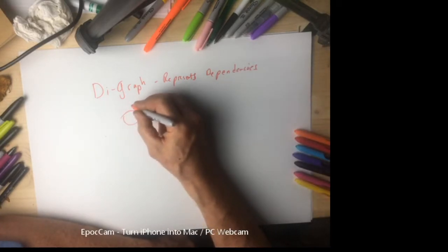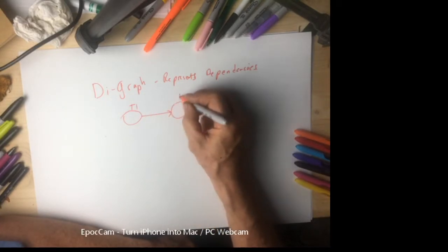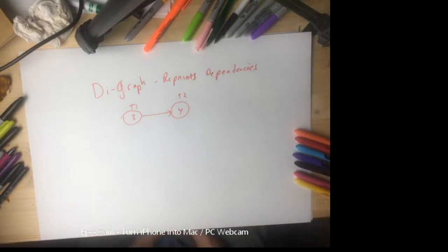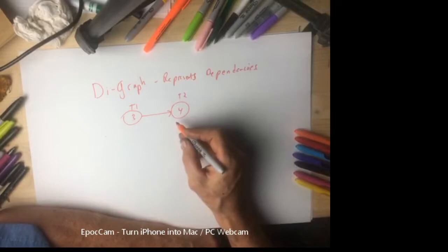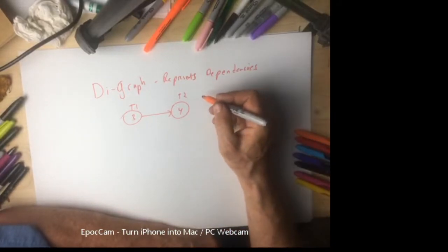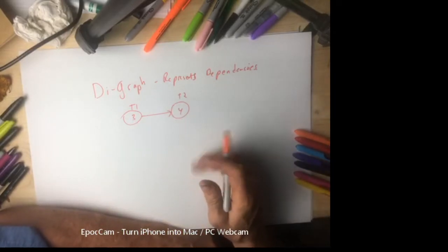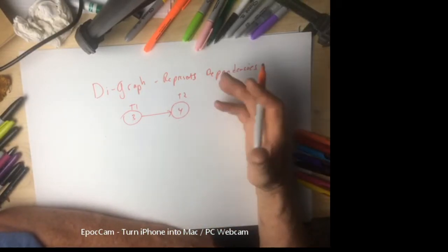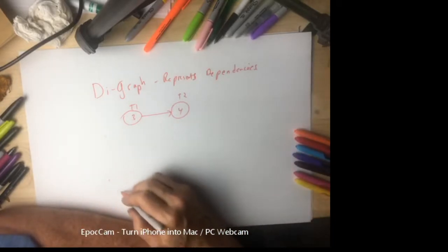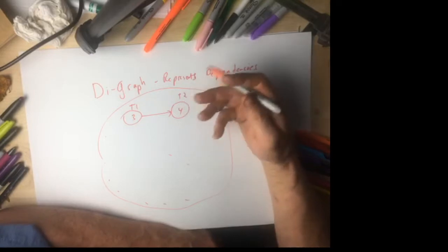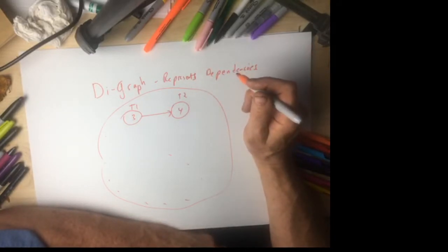So when we do the following, this very clearly indicates that we have a task 1, which will run for 3 time units, must be completed before task 2 can even start. And therefore, right now, without more to this graph, there's a critical path of at least 7, which means if there's much more to this process, already you know it's going to take at least 7 hours to complete.